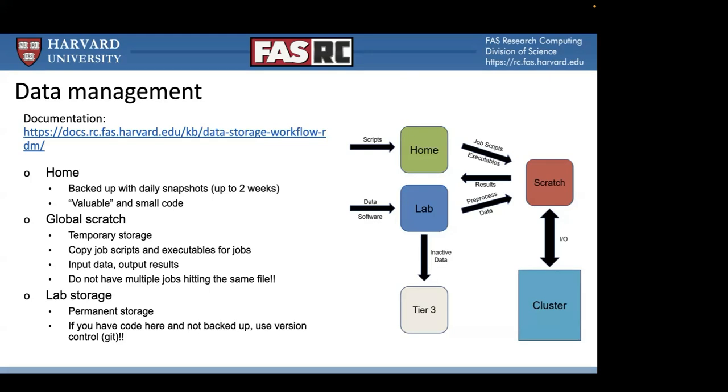So that requires a lot of good communication and also good planning. If you know that someone is going to be working on something that requires 3 terabytes of space, and you only have 5 terabytes left in your lab storage, well, then you need to discuss whether additional storage needs to be purchased, or if you all need to fix your timelines for who's going to be working on what project based on your ingest expectations for what you need for both datasets, processing, and result space.